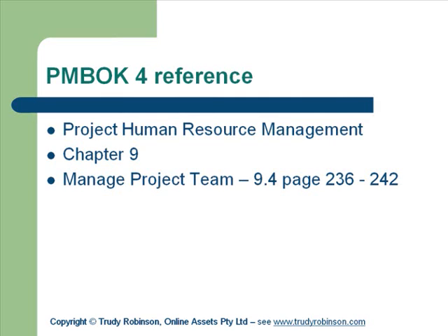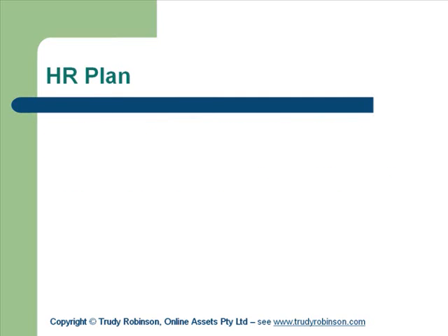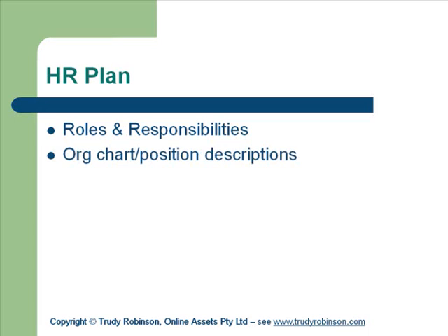Okay? If we were going to do a full HR plan for a project, we would include roles and responsibilities. We've already discussed roles and responsibilities and finding who to apply to the tasks. We have talked about organisational charts and position descriptions. The position description I uploaded online is an example that you can use to help clarify the skills you need for a particular task. You don't fill in a position description for everybody on the project team, unless it's a really substantial project with a lot of risk involved. But it's there if you need it.